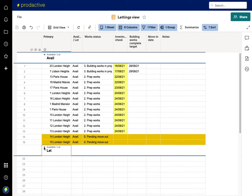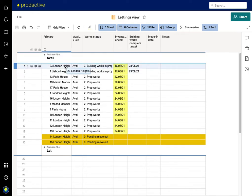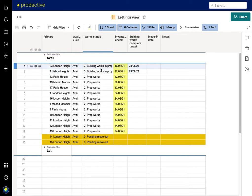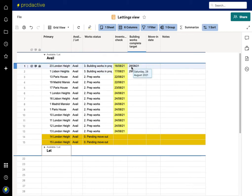You can hide it from this side and here - if they say right, 23 London Heights, I'm checking this one. Building works are in progress, it's due to be completed on the 28th. Well that's great because I've got someone who's due to move in.